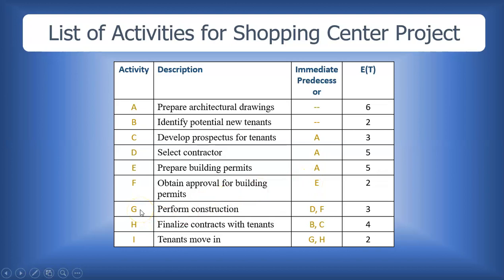Activity F cannot commence until we have completed activity E. For activity G, before we can commence activity G we must have completed both activities D and F. Activity H cannot commence until we have completed both activities B and C. And finally, activity I cannot commence until we have completed both activities G and H.